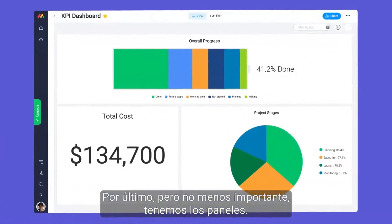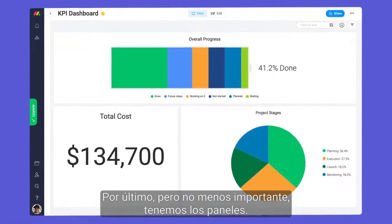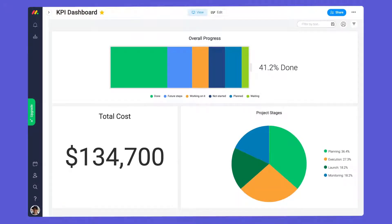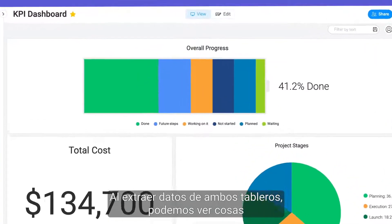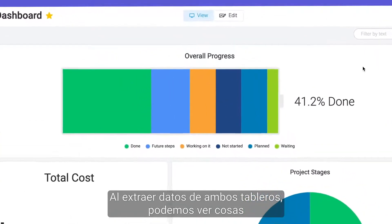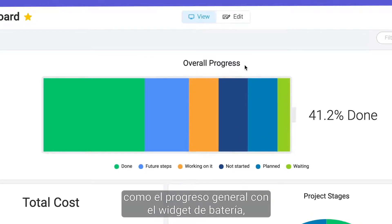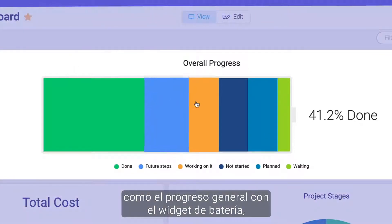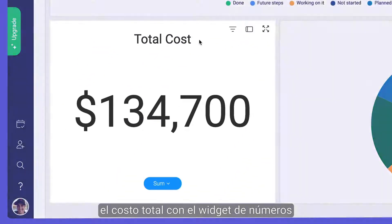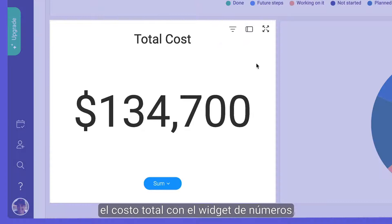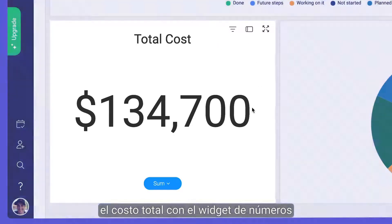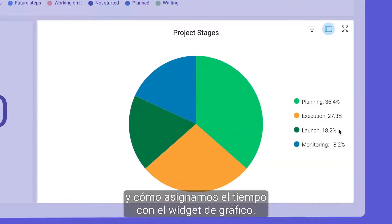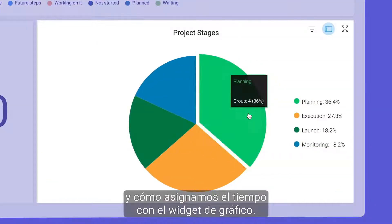Last but certainly not least, we have our dashboard. By pulling data from both boards, we can see things like overall progress with the battery widget, total cost from a numbers widget, and where our time is allocated with a chart widget.